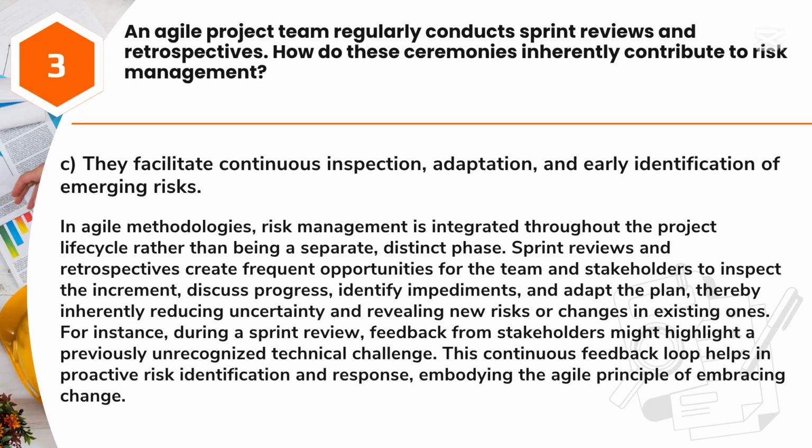Answer: C. They facilitate continuous inspection, adaptation, and early identification of emerging risks. In Agile methodologies, risk management is integrated throughout the project lifecycle rather than being a separate, distinct phase. Sprint reviews and retrospectives create frequent opportunities for the team and stakeholders to inspect the increment, discuss progress, identify impediments, and adapt the plan, thereby inherently reducing uncertainty and revealing new risks or changes in existing ones.